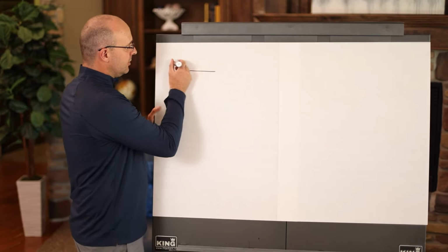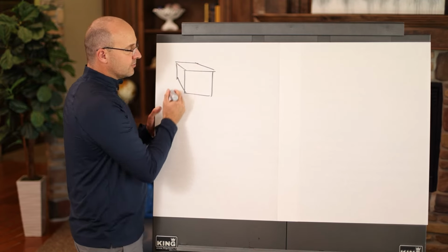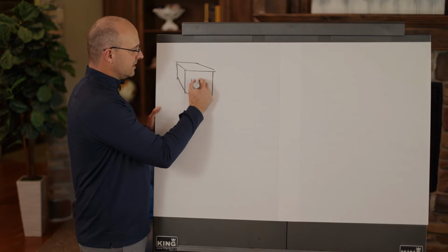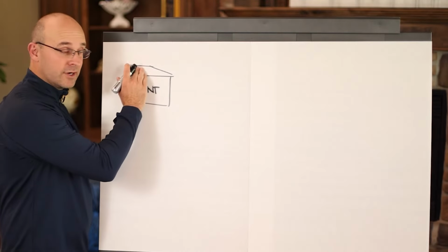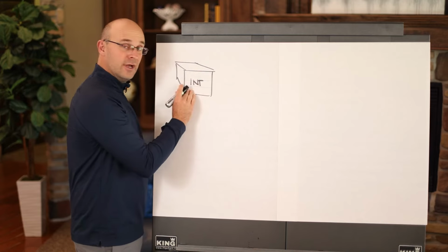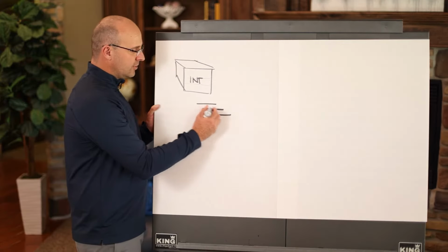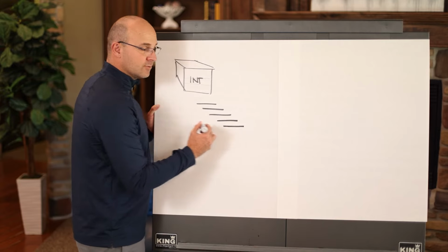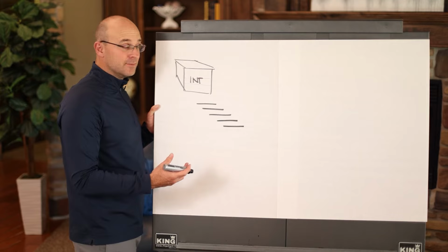But if you want to get started, here are my suggestions. Number one, inside your building, you have a number of different phases. I have found that project teams do really well when they start with the interiors. It is definitely a good grouping of rhythmic work. It's easy, floor by floor, to create zones. It has a standard sequence of trades, and you can create a takt plan that's really nice and rhythmic, and you can get a good feel for the system to start.